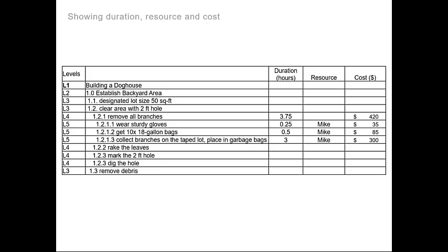When scheduling, you would place the duration of each activity at the lowest level along with the resource used, whether it be a person or an equipment, and the cost for doing the type of work.